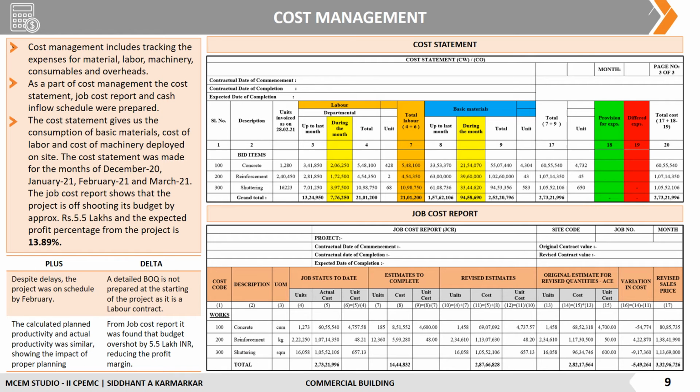Cost management. Cost management includes tracking the expenses for material, labor, machinery, consumables and overheads. As a part of cost management, the cost statement, job cost report and cash inflow schedule were prepared. The cost statement was prepared for the months of December 2020, January, February and March 2021.